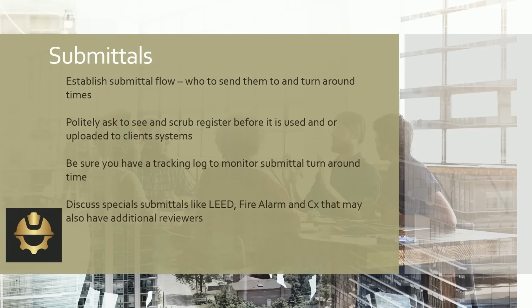We may do a module on how we actually did that and give you some more insights, but just keep that as a feather in your cap that you can do that with certain entities. Say you just got the electrical bought out. Just getting most of that electrical equipment in as part of the design is going to save you time. Or if you've got just your mechanical sub, anything that you can do is going to save your project time and money on the back end.